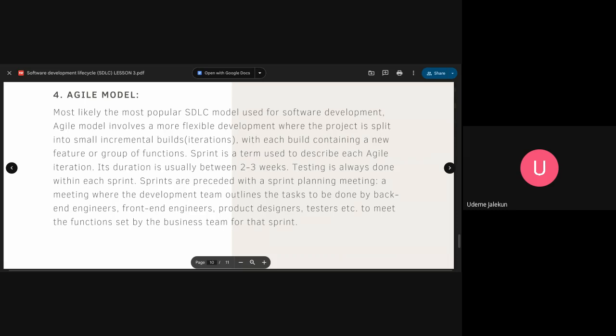The next sprint, we now say, okay, what's the second chunk of work we want to do? Login. So they spend another sprint. Everybody goes through the same process: analysis, design, implementation, testing, etc. Login is now ready. So 2 features are now ready: account creation and login. Then we move to the next feature, dashboard or the home page. Everybody spends another 2 weeks working on that. At the end of the 2 weeks, once everything is fine, we deploy that to production. So now customers can create accounts, customers can log in, customers can view their dashboard at the end of sprint 3. Sprint 4, we now say, okay, what's the next thing?